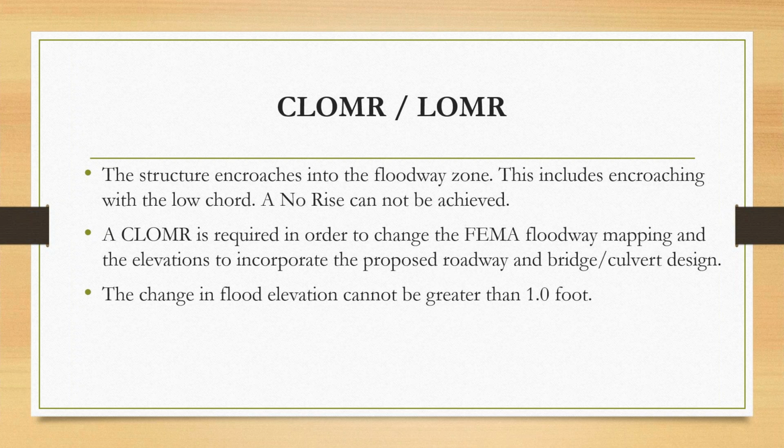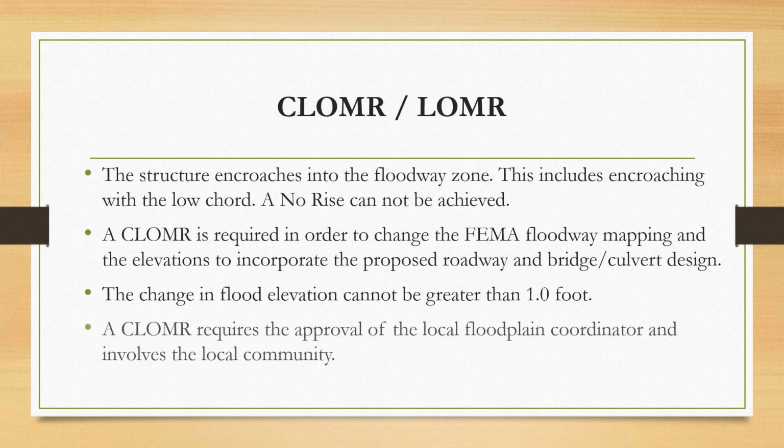The change in our flood elevation, if we're making a change, cannot be greater than a foot. If it gets greater than a foot, then we're buying everything above that. We're going to own it. CLOMAR is required. It requires the approval of the local floodplain coordinator, and it involves the local community. We have to deal with the local floodplain coordinators.